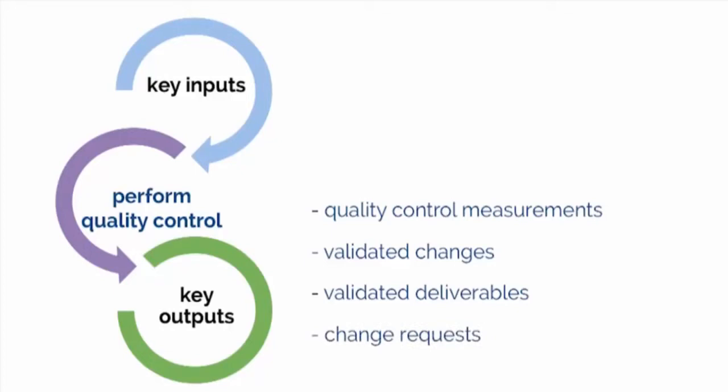Change request. If it becomes necessary to make a change to the project management plan because of some necessary corrective or preventive action, then we initiate a change request in accordance with the defined Perform Integrated Change Control process, which you may recall is a process in project integration management.